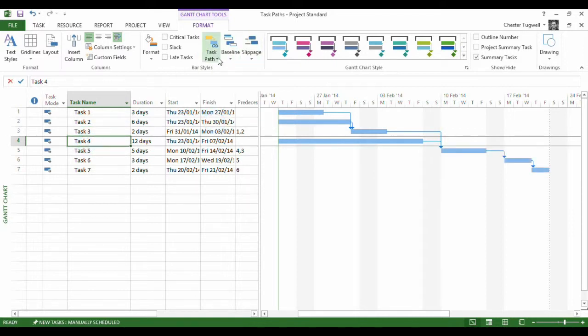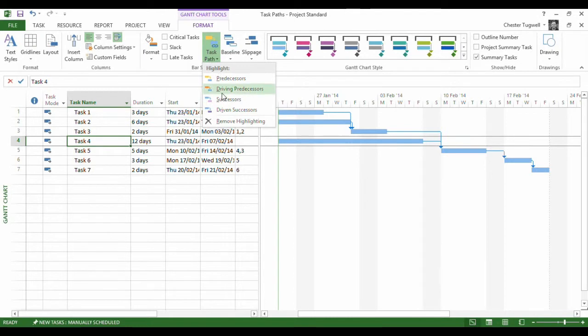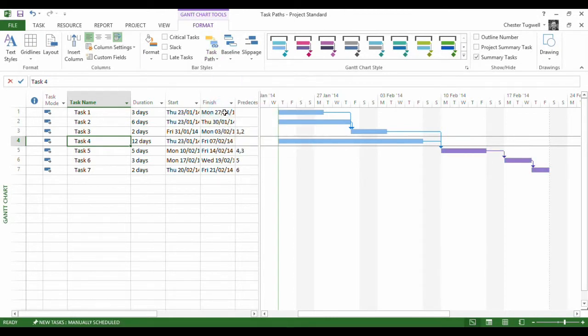So I'm just going to make sure I've removed any highlighting. I go to task 4 and let's see what this shows up if I choose Driven Successors. And there we are. We can see that these tasks are driven by this task and not this task.